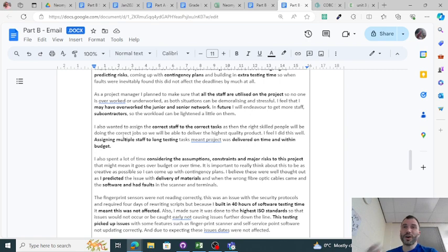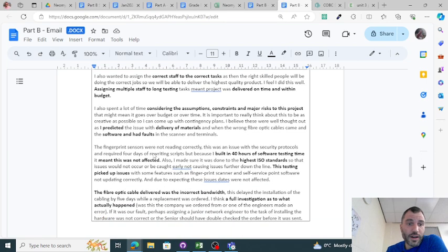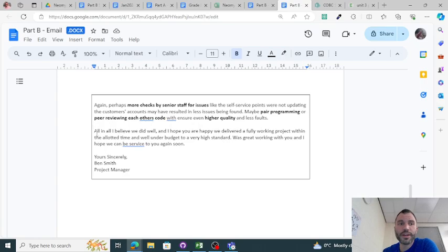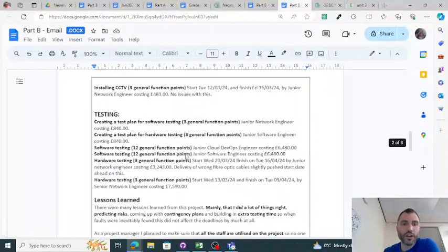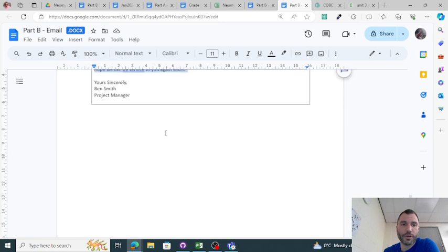But then, you know, it's good to go on about what you've done right. I considered the assumptions and risks so that these things were not going to be an issue. I also built in an extra 40 hours of software testing time and 36 of hardware, and I did it at the highest testing standards. It meant we picked up on those issues before they became really bad issues, and we got them fixed and it didn't affect the deadlines. And then again, I start it in a good way with a summary and end it in a nice way with a summary.